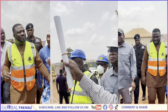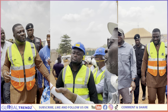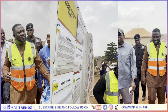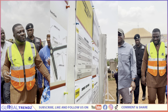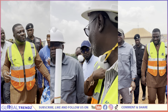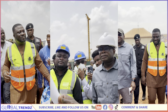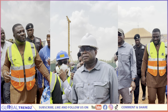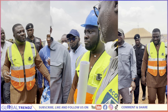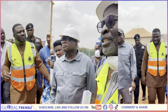So this is the local roads components. This is the project overview. As usual, it is the consultant. This one was a 2-year project. We have exhausted the time. The contractor has put in an application for extension of time, which will be sent to maybe your office for consideration. What percentage of work has been done? It is about 63%. Yes. But the challenges, as I draw to the end, I'll bring them all to your attention. The challenges why they were not able to finish all these activities.